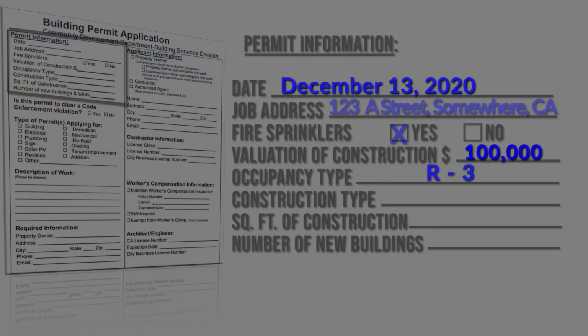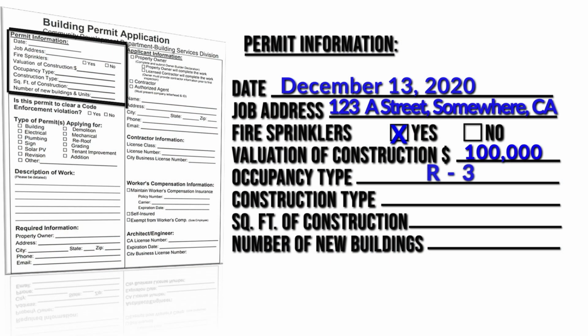Now that we have covered construction types, the addition to the single-family residence that we are submitting for will be constructed of standard wood stud framing, as allowed by code. Therefore, here we would indicate construction Type 5.